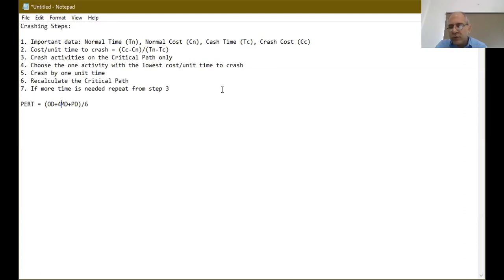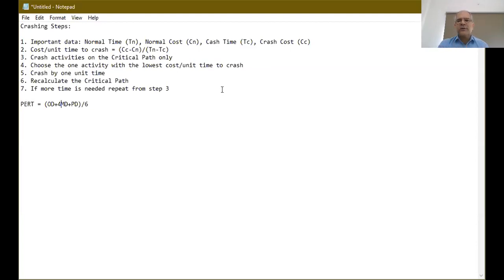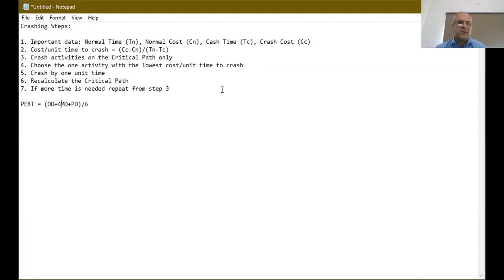We choose the critical path activity with the lowest crash cost per unit time because crashing adds to project cost and we want to reduce duration at the least possible expense. We crash by one unit at a time — for example, if activity A can go from ten to five days, we reduce it by one day, recalculate the critical path, and repeat.